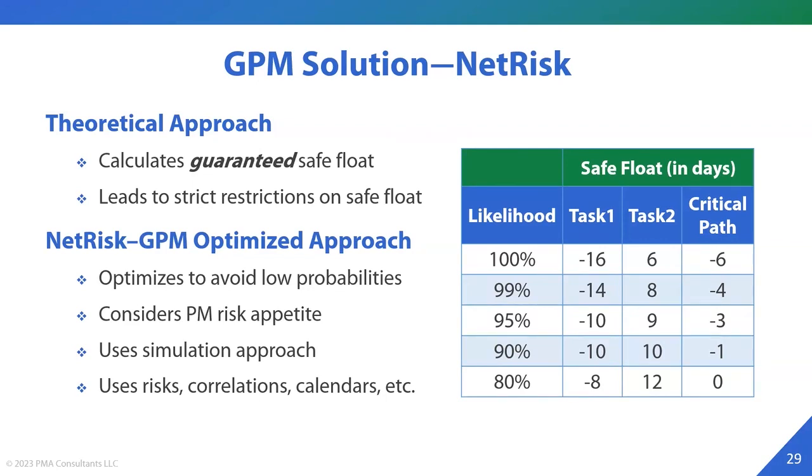Well, it can happen. There is maybe a 0.001% chance of that happening in a 200 activity schedule or a 2000 activity schedule, but I wouldn't say that's very likely. So the theoretical approach does do that. It gives you that 100% level, that there is absolutely 100% guarantee that if you remain within these duration ranges, and if you use these dates, you will not be delayed.